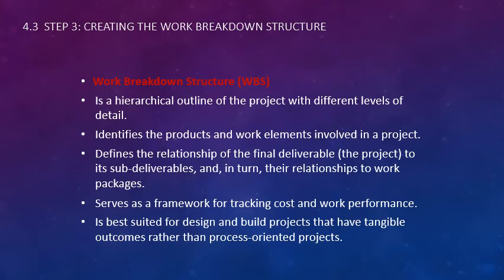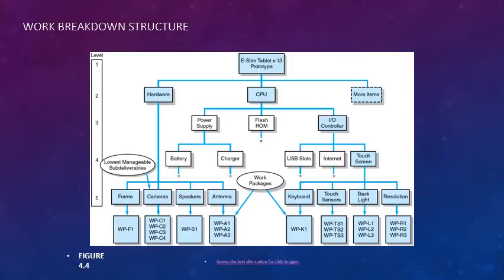There's a lot of software that you can use for this to build it up and to have it more aesthetically pleasing, but it can simply be done in something like Microsoft Excel or PowerPoint, and there's lots of templates out there. It really serves as the framework for tracking cost and work performance, and it's best suited for design and build projects that have tangible outcomes rather than process-oriented projects.